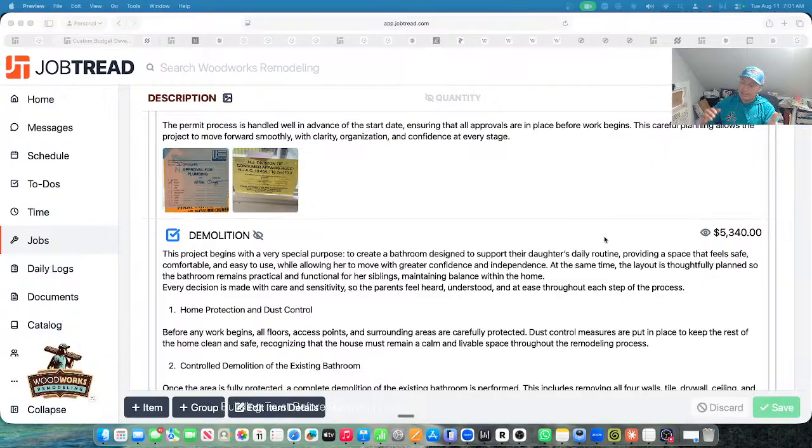Like I said, 99% of the time it really goes about 10% more than what we calculate on the time. Something takes a little longer than expected, takes a little more material cost, and all of those things. So, alright, I hope that answered that question.